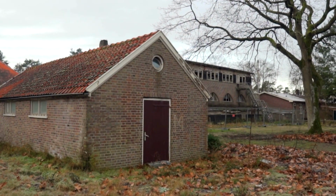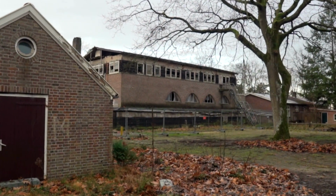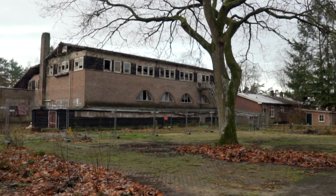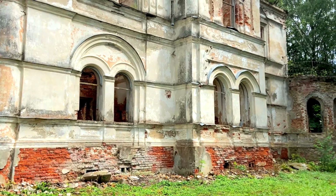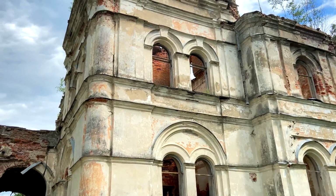Unapproved changes may require retroactive consultations, which may delay projects or jeopardize funding for the project. FEMA emphasizes stakeholders should provide FEMA early notification of scope of work, SOW, changes to mitigate risks, and ensure compliance for all projects. Applicants should communicate proactively to avoid denial of their grant funding.